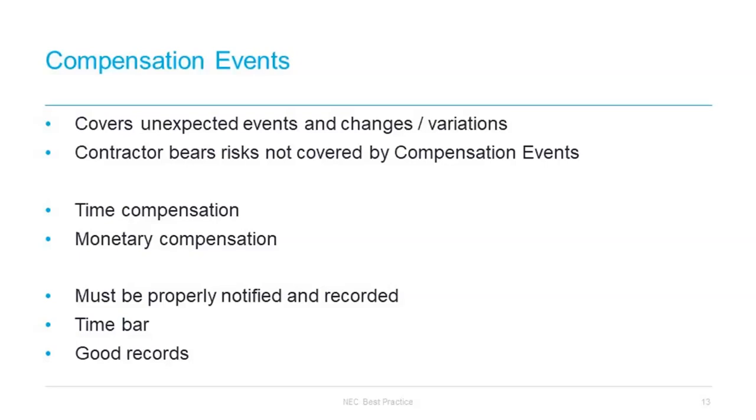For the time impact of a compensation event, it's assessed against the latest accepted program by reference to changes to the completion date or to any specified key dates. It is in this case that an up-to-date accepted program is really important for a contractor.